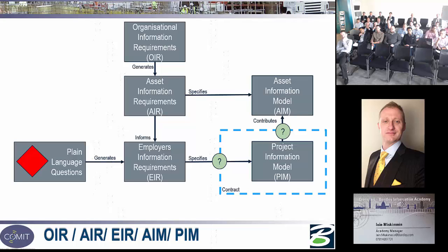And unless you're very specific about what you mean by BOW, you're going to get 20 different answers. And the problem is when you've got a complex engineering environment and you give something that's woolly out to all your contractors, they come back with 20 different things. And well, actually, I conformed with your contract. That's not a problem. Oh, yes, you did, but it wasn't quite what I was looking for. Well, if you want me to do something different, you're going to have to pay me some more money.